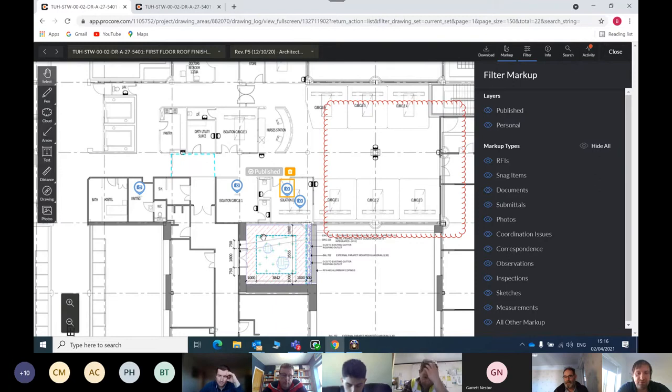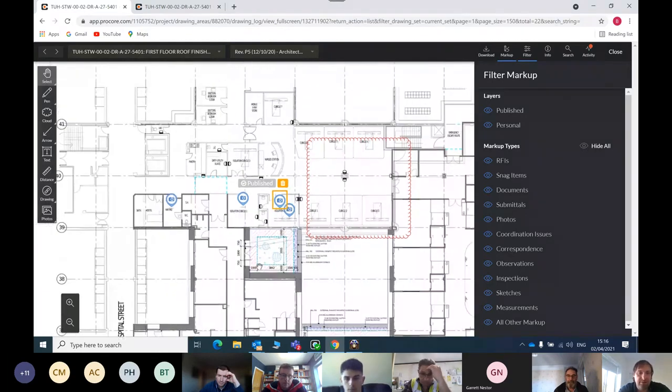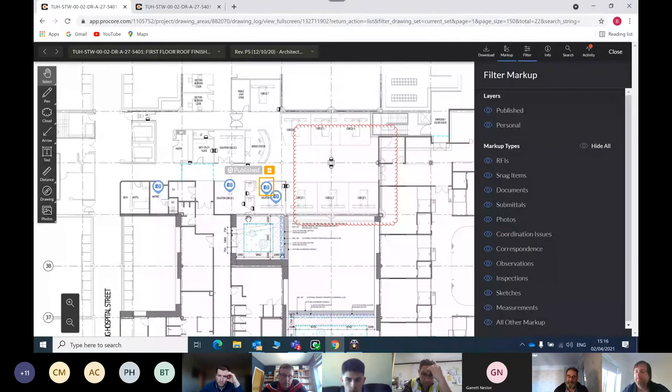Use an observation or whatever. Yeah, the idea of the pins really is to create that history of that room. It would be useful for me because I'm often looking for true photographs 2 years after the event. If there was a claim, I might be looking for what was the condition of the room on the day the guy claims that he fell or slipped or tripped. So that would be useful for me probably 2 years down the road, when most of these things come to light.